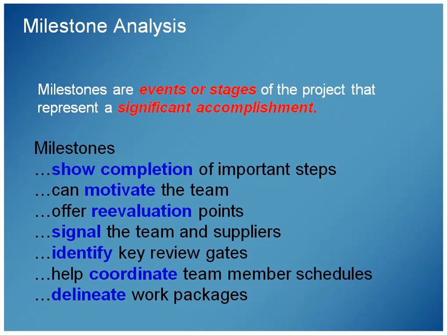One of the main problems with the milestones method is that it's really a reactive control system. You must first achieve the milestone and then evaluate those milestones relative to your goals. If there's any problems, you don't know about them early. In fact, you might not receive any progress reports to indicate problems up until the point that the bad news is made available not only to you but to people outside your group, and possibly even made available to the public. So it's a common and an easy thing to do. It's also a little reactive, as opposed to sensing problems before they happen and being able to take more proactive steps.